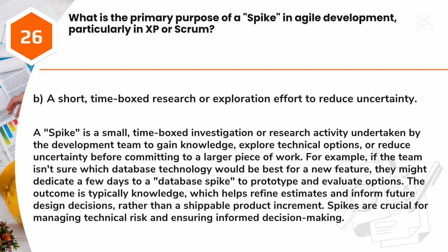For example, if the team isn't sure which database technology would be best for a new feature, they might dedicate a few days to a database spike to prototype and evaluate options. The outcome is typically knowledge, which helps refine estimates and inform future design decisions, rather than a shippable product increment. Spikes are crucial for managing technical risk and ensuring informed decision-making.